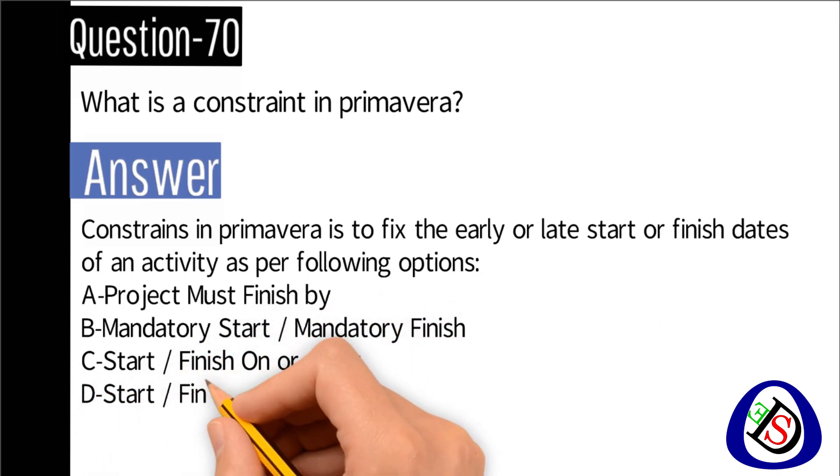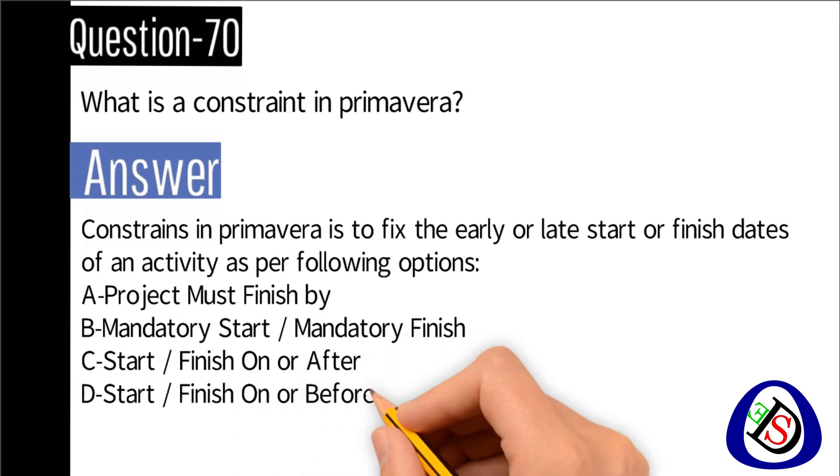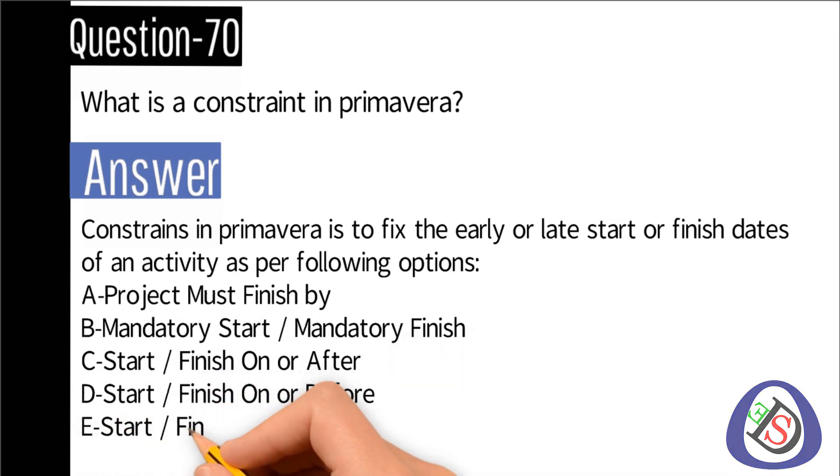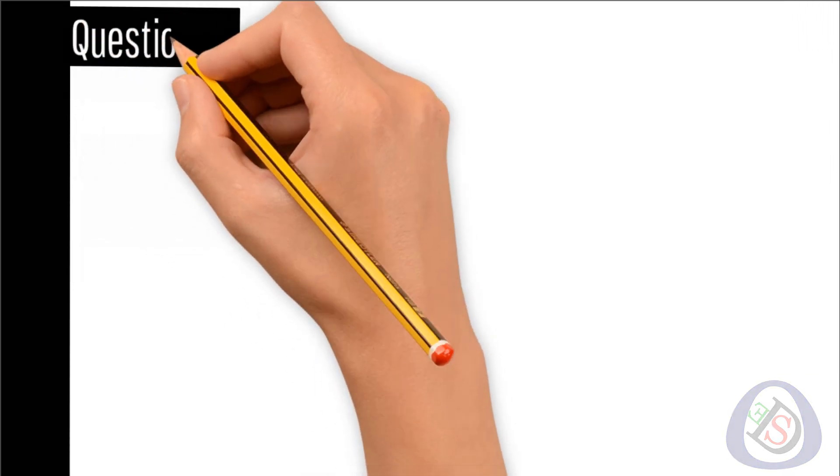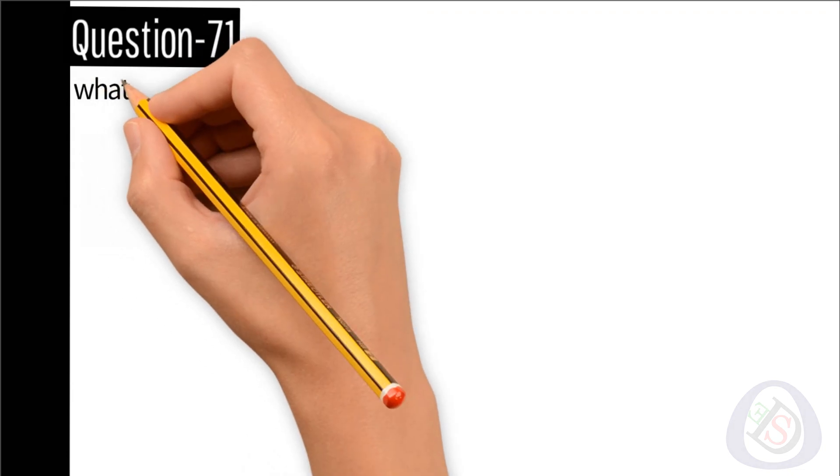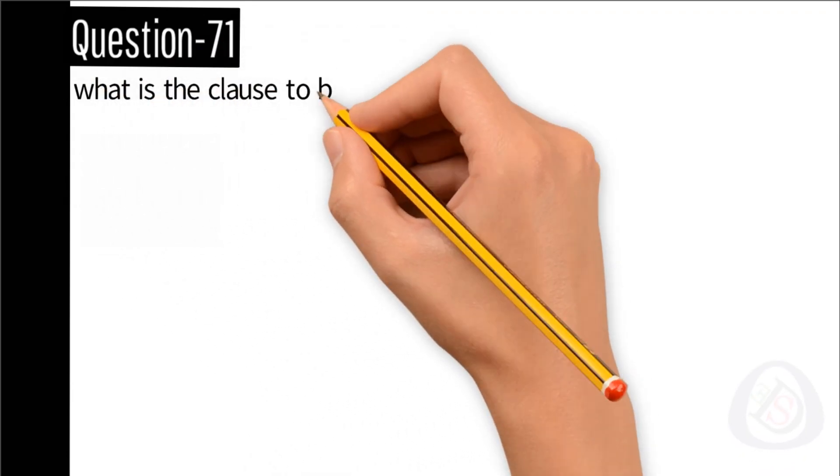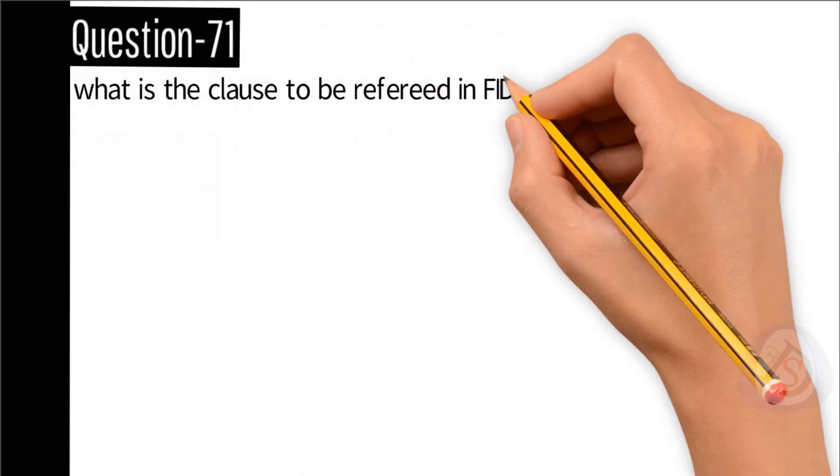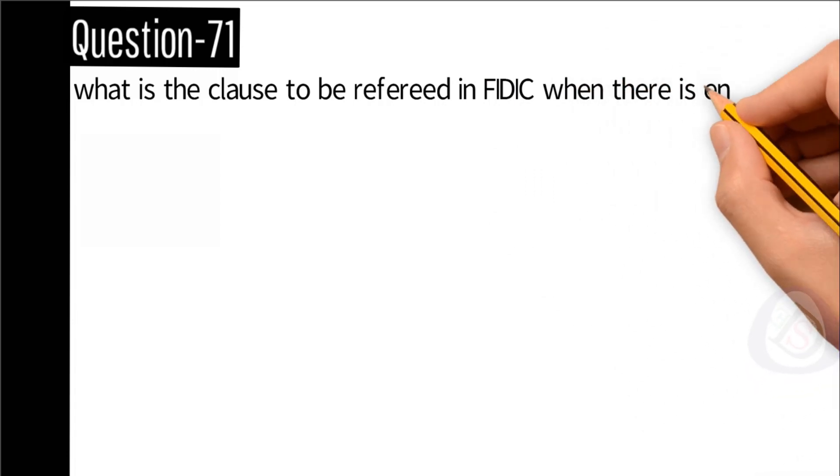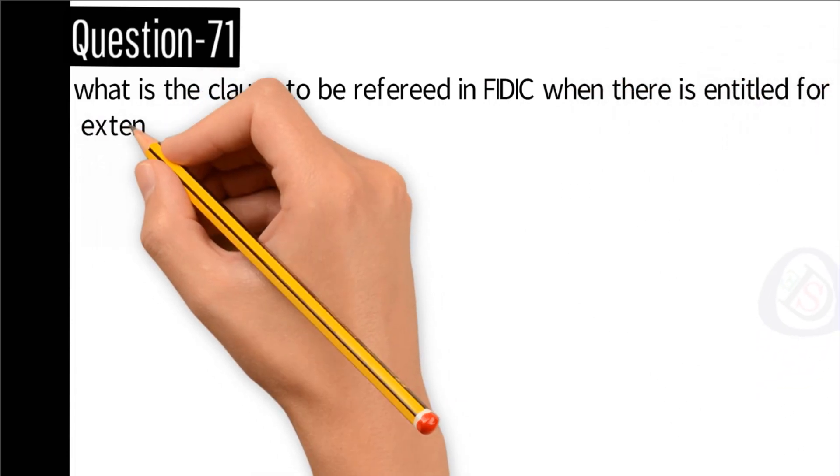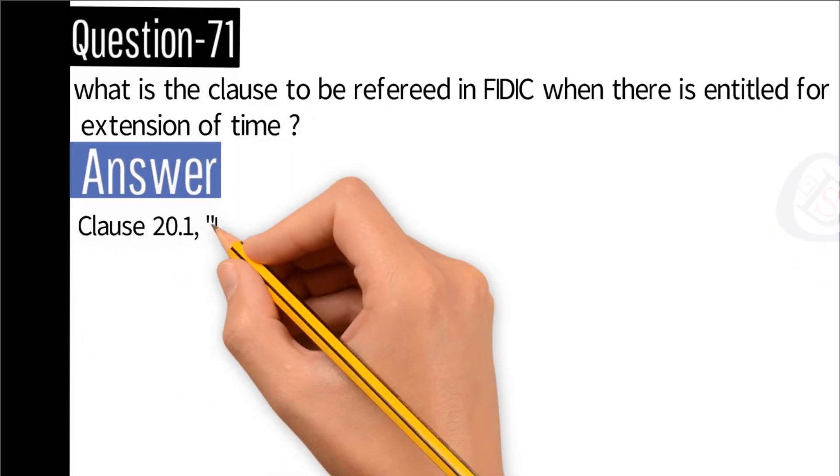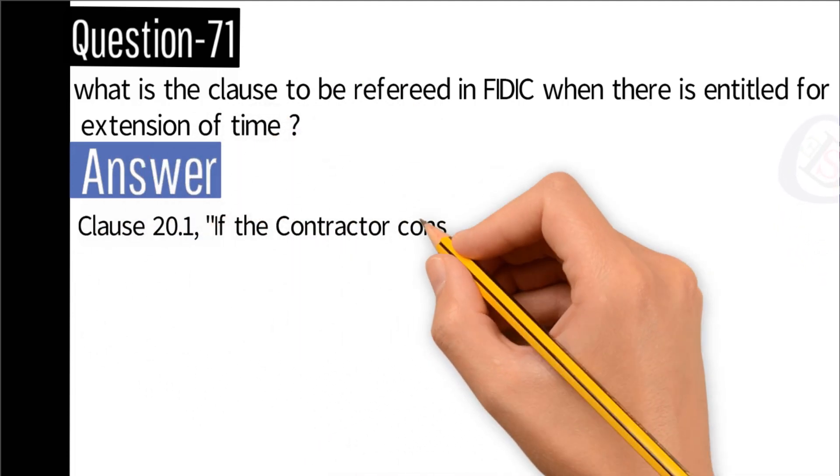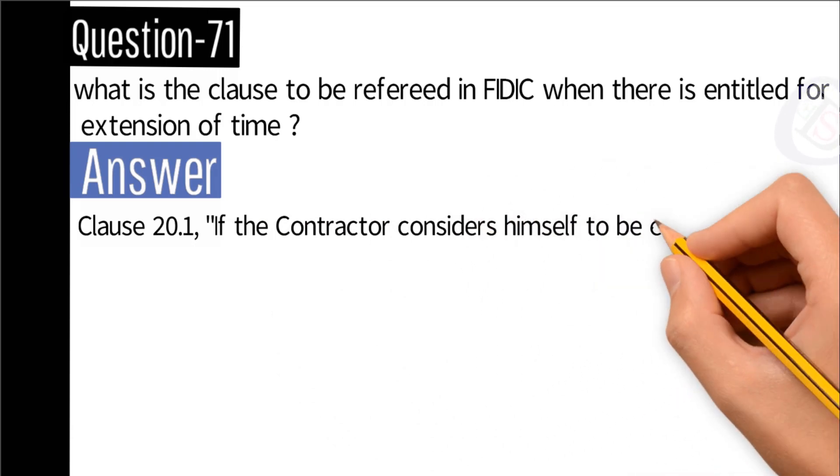B, mandatory start or mandatory finish. C, start or finish on or after. D, start or finish on or before. E, start or finish on. F, expected finish.